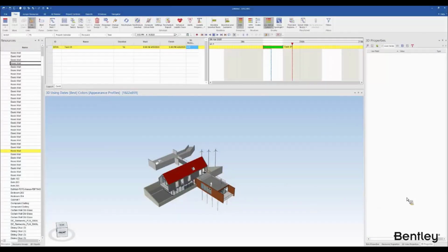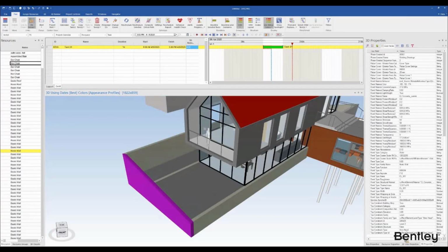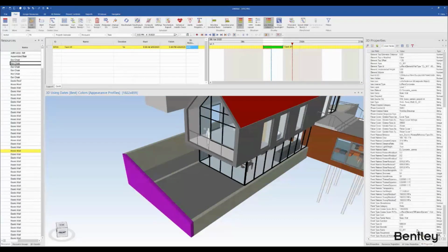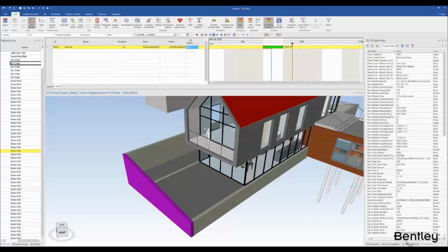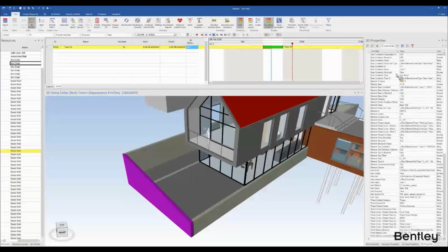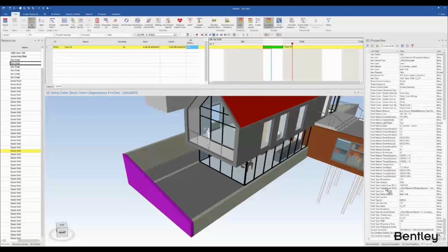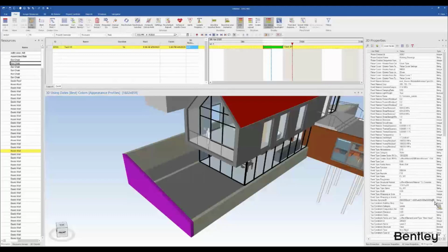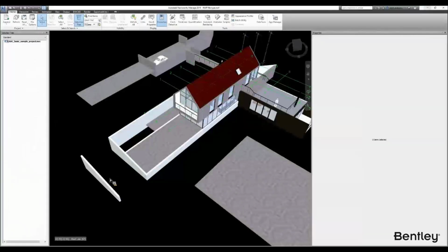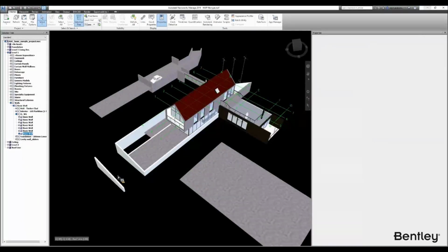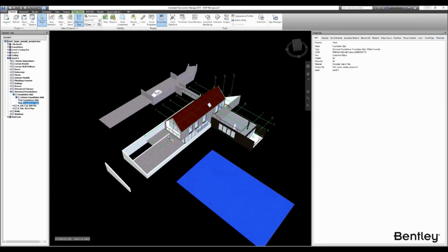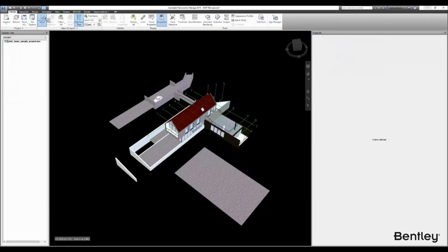If I click on this one, check the user fields. All right, there we go. It's the same ID ending with B9F. But we created a new object, so this object doesn't have that Synchro ID at all. Not even this one. So the new objects won't have the Synchro ID.